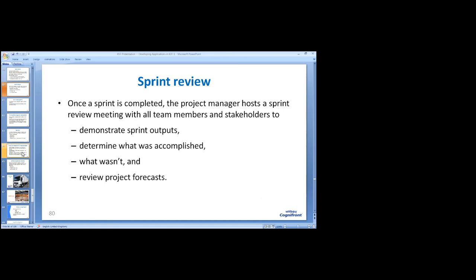Whereas in waterfall model, you are developing stage by stage. And let us say your deployment stage comes after 1.5 years. So the errors or the problems will be disclosed only 1.5 years afterwards in the deployment stage. So you have already lost 1.5 years and then you come to know about the difficulty. But in this agile methodology, in every sprint, that is every month or maybe every week, you are going through all the tasks and problems that you encounter. You have enough time to fix them quite in an early stage.